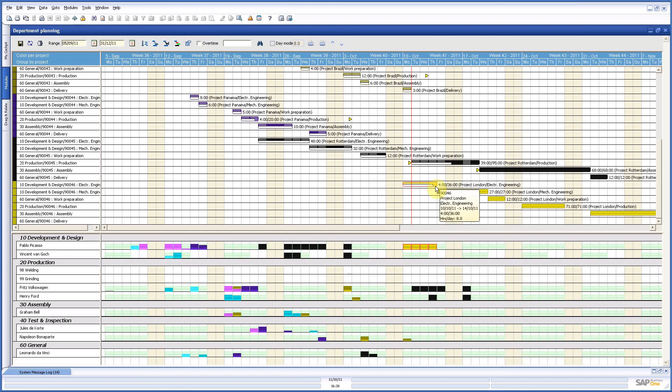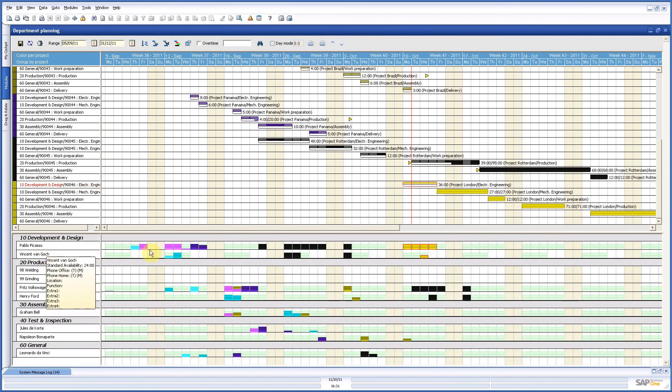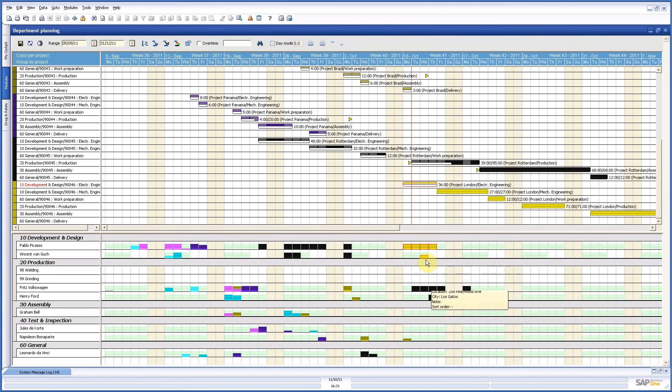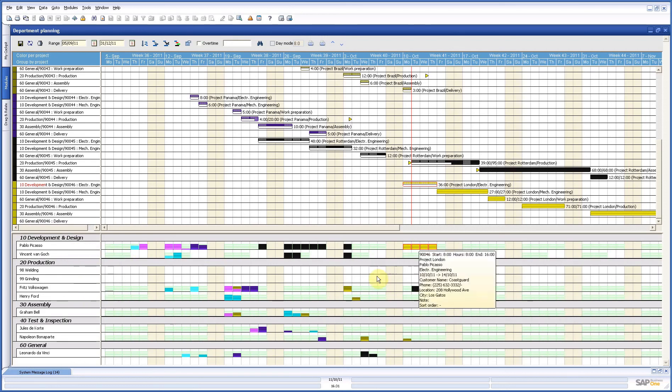Because I can say, okay, I pick up these four hours. And I put them here with Vincent. With Vincent, you also see here that he has two white spaces. That's because in his calendar it says he only works three days of eight hours, which is the 24 hours of capacity you have here. So this way you can just pick up time and give it out. Very straightforward. And here you have a directly complete overview of the load of your personnel, machines, whatever you need.